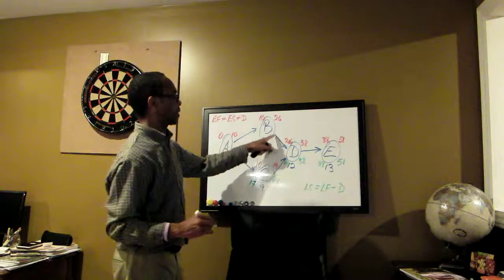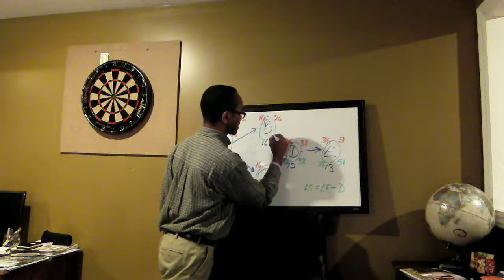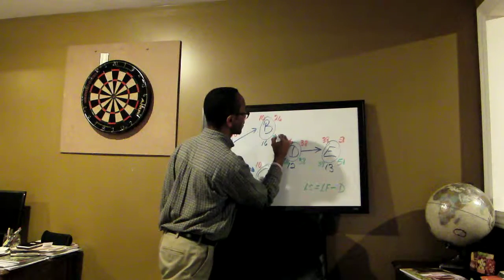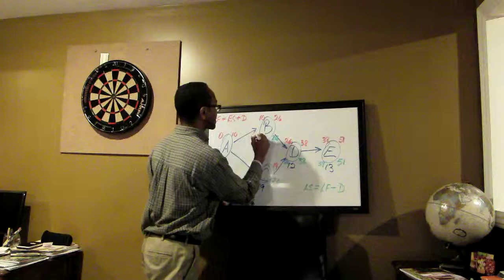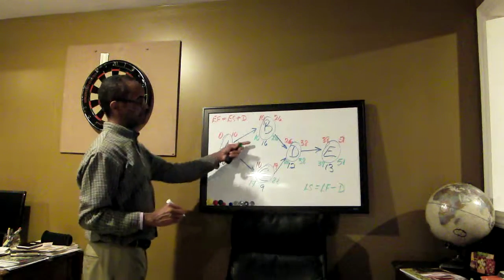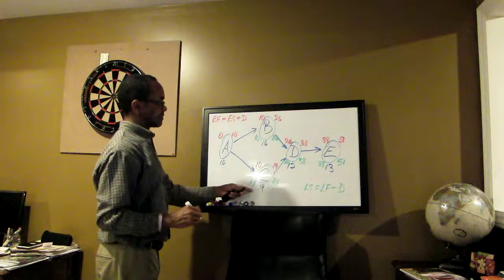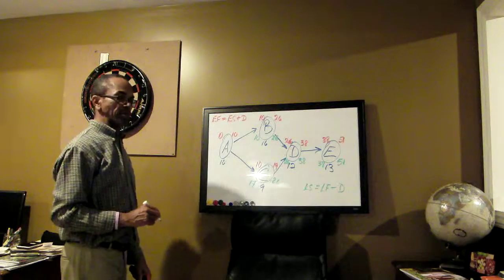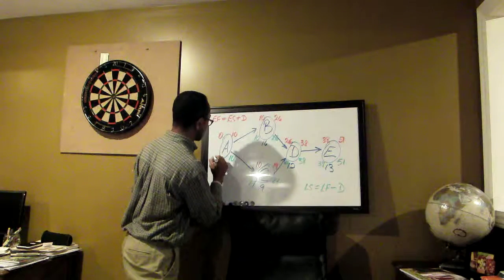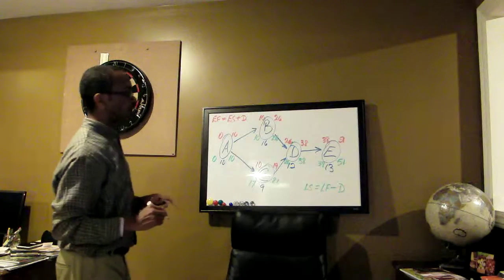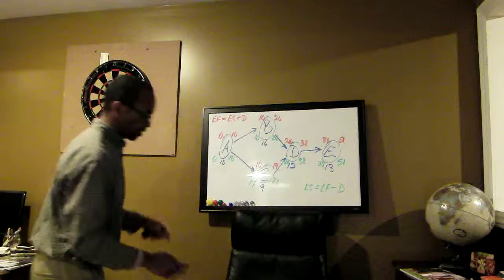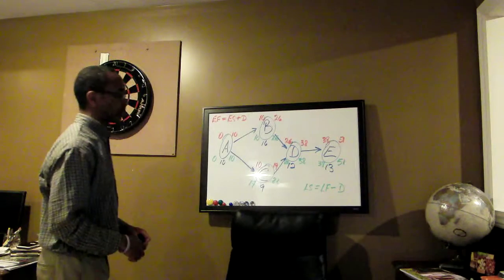What do we do over here? We take our 26 over here. Our late start becomes our late finish at B. So 26 goes here. 26 minus 16 is 10. And now we have to make a decision here. We have 10 and 17. And it says we take the smallest number over to A. So it's 10. 10 minus 10 is 0. So we have completed our forward and our backward pass computation for our simple network diagram here.